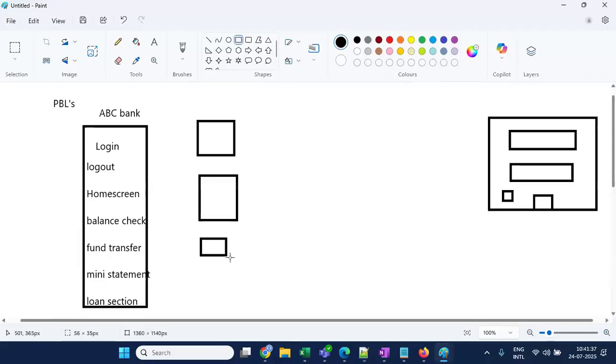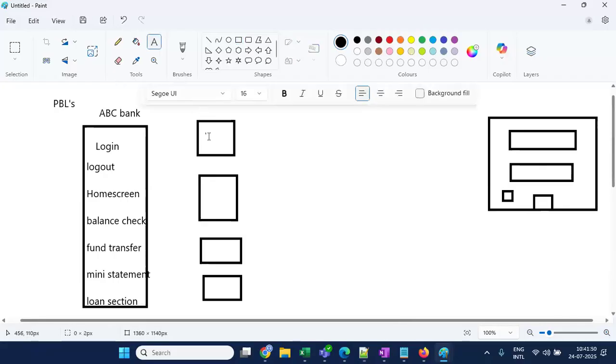Sprint 1, sprint 2, sprint 3, sprint 4, and so on. Let's say for example for the login page, I can complete the backend portion first, related backend databases and API integration. Let's say I include the login-related backend things in the first sprint, and all other integration of that particular backend, and then the entire login web user interface I am taking up for the second sprint.